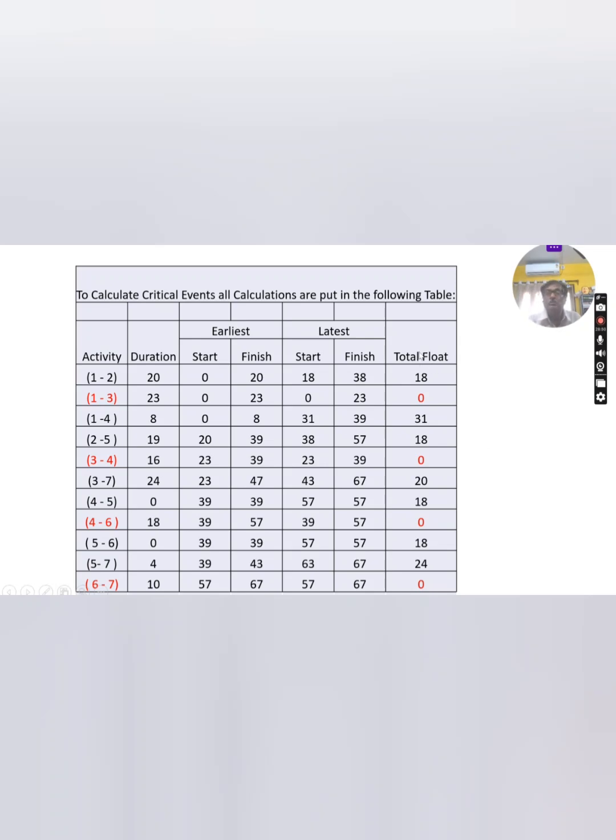Now finally, total float. How will you compute total float? Total float means latest finish time minus earliest start time minus the duration of the task. Float means the available time by which an activity can be delayed while the project is still completed within the maximum permissible time.